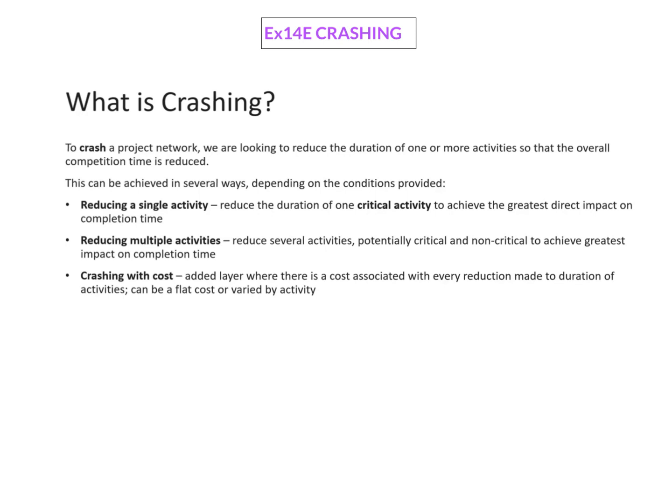So what they're going to do is they call it crashing. They might hire a few more employees and crash one of the activities, meaning they'll pay more employees to get that activity done quicker, because they want the overall project to be reduced in time. There's a few ways that we can crash.